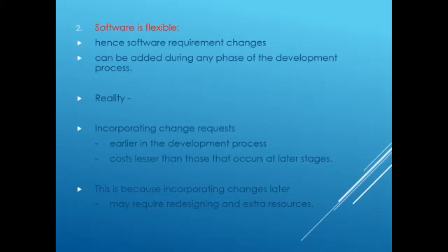But friends, the reality is that incorporating a change request earlier in the development process costs less than those that occur at later stages. This is because incorporating changes later may require redesigning and extra resources. This is the second software myth.